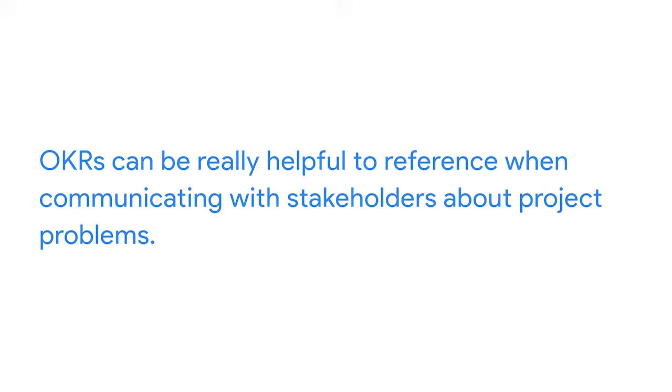OKRs can be really helpful to reference when communicating with stakeholders about project problems. You can make it clear to a stakeholder why a given problem needs to be addressed by identifying the specific ways in which that problem might impact an organization's wider OKRs.